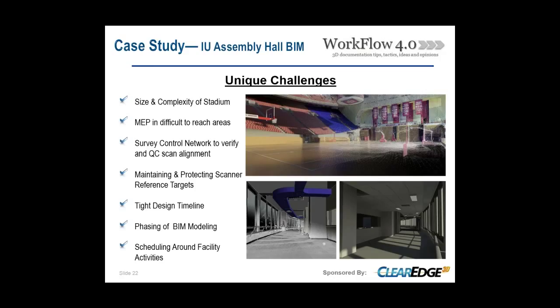Since this project was going to be phased, due to a very tight design timeline, we had to, and of course for all our projects we do this, but for this one, a survey control network, so having that there was going to be paramount for the success of this project.